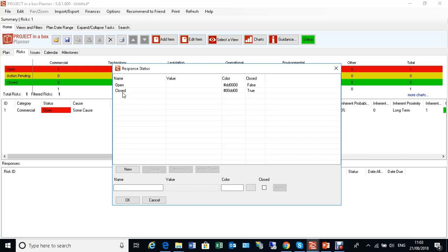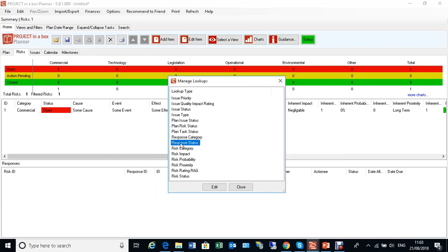That they're going to be matching lookups. So you start working on a risk, you put in place some response actions, that risk unfortunately becomes an issue, that all then transfers across, and all the information you've collected in those will be transferable directly. Should they be different, the response lists and types, etc., then that's not the case. So we do try and keep them the same, using the same categories.